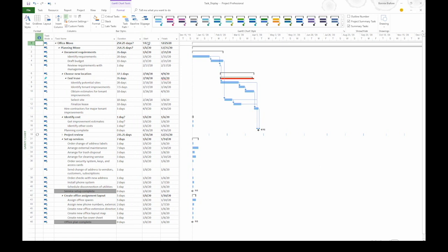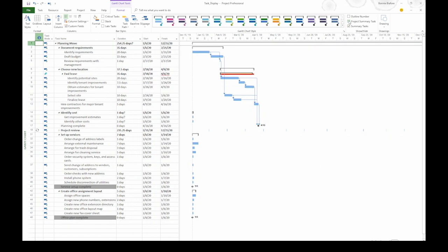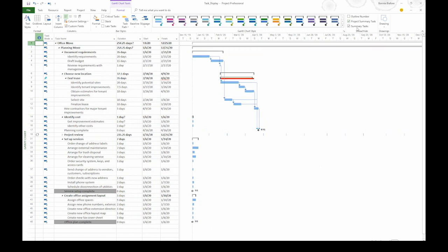And if I displayed other tables, I could see the total cost or the total hours of work. If you want to turn that off for some reason, turn off the project summary task checkbox. However, I find that to be really useful, so I'm going to keep it turned on.